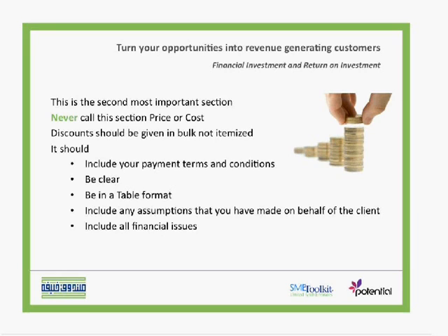So include your payment terms and conditions. What's the first payment? When is the second payment, etc.? Be clear. Don't try to hide some things. Put them in a table format so that accountants, when they see them, find it simple to know all these numbers. Include any assumptions that you have made on behalf of the client and include all financial issues. Don't forget to fill anything.